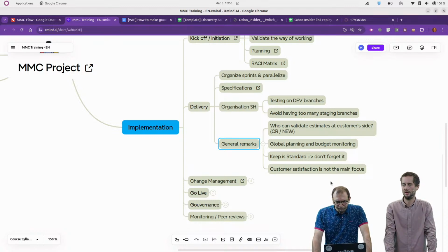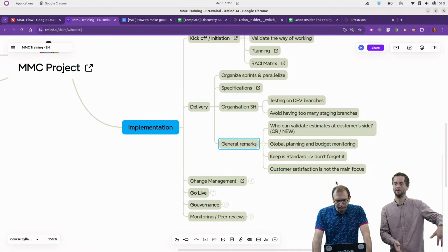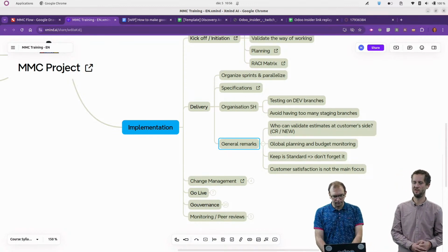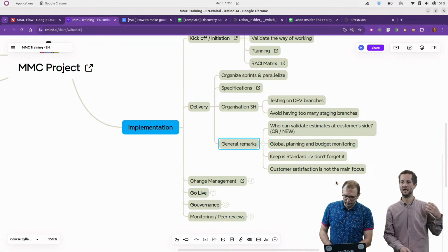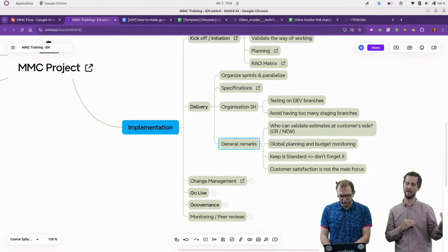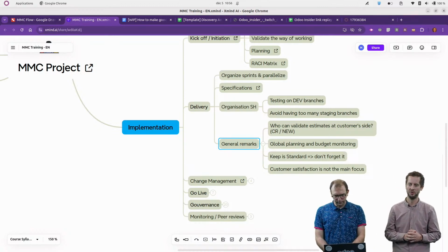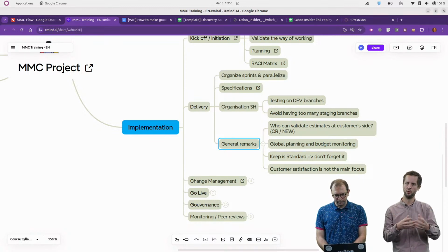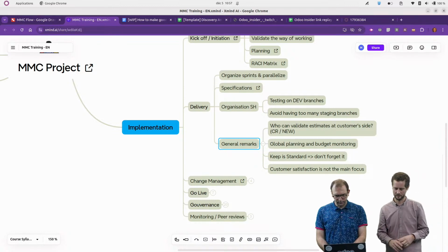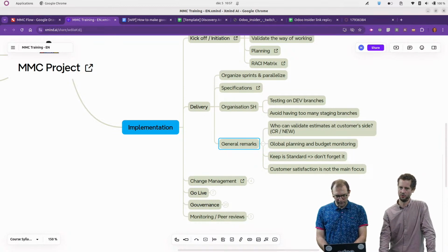Yes, we should discuss this technical debt that you have to drag for the entire life of the project. Every development has an impact and a cost, so it's important to keep that as low as possible, to avoid having issues in the maintenance phase or the upgrade phase, because the lower the technical debt is, the bigger the chance that everything will be smooth. So here it's important to keep the project as standard as possible.